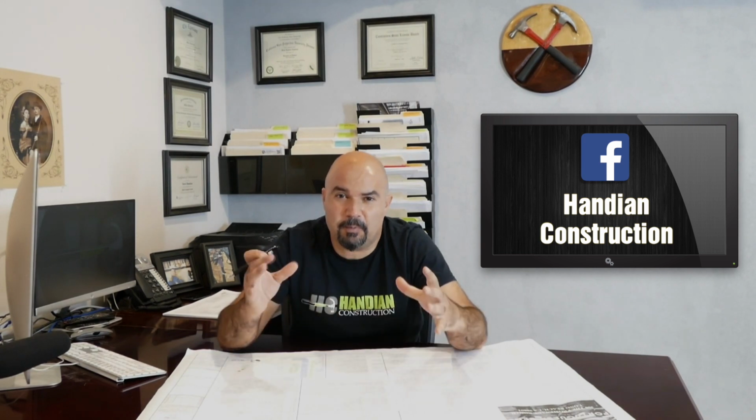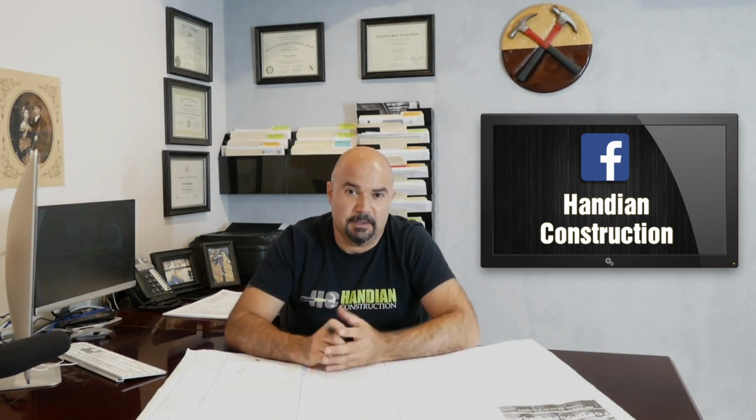So it's good to let the general, first of all, handle the hood. You want them to warranty the hood. That's your biggest money maker. So the hood is the part that you're looking at. That's just the can, a stainless steel square box. Everything else, the ducting that goes all the way up to the roof, is all fire wrapped. That's custom work. That gets 3 inspections, sometimes 4. They can't have a single hole in that system. The exhaust system, the makeup air, your fire suppression. There's a plumber involved in this. There's an electrician involved in this. So there's a lot that goes into it. But you want the hood to be very efficient.